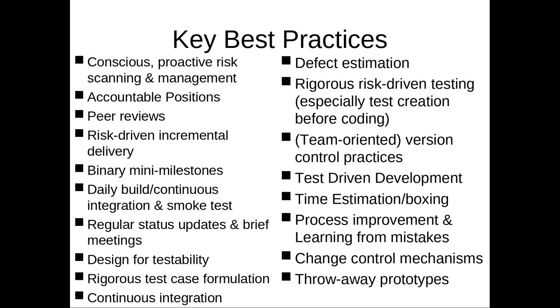Small increments. It's easier to find defects or missed requirements or misunderstandings. Good. Yeah. We can iterate back to the stakeholders. So that's a good one. Sometimes stakeholder needs change. And if the needs change, delivering things in pieces allows them to always say, what's the next priority? Sometimes the thing that was really low down earlier ends up being a bigger priority.